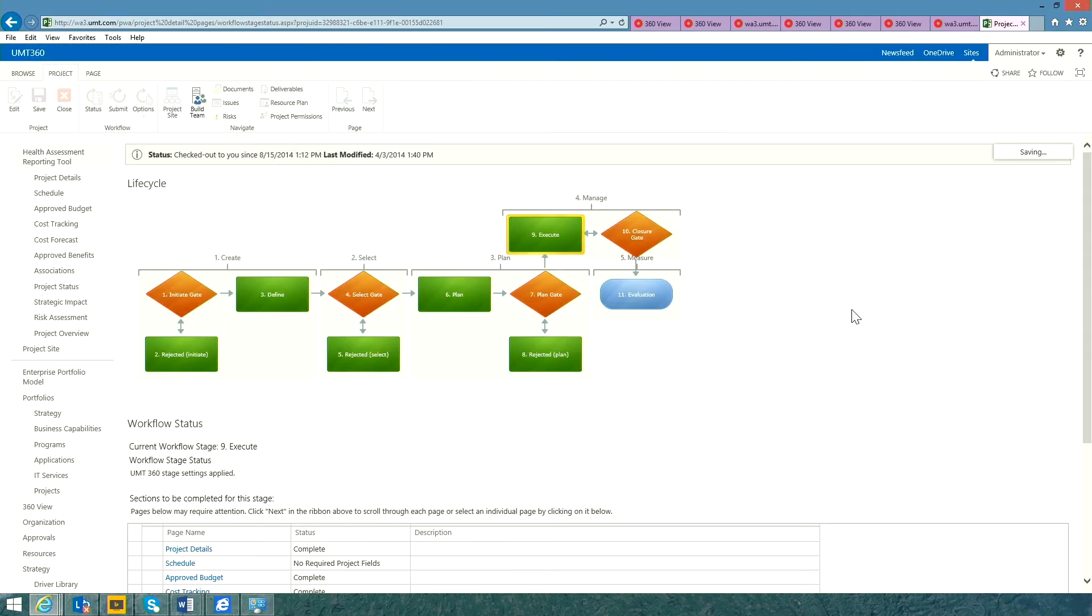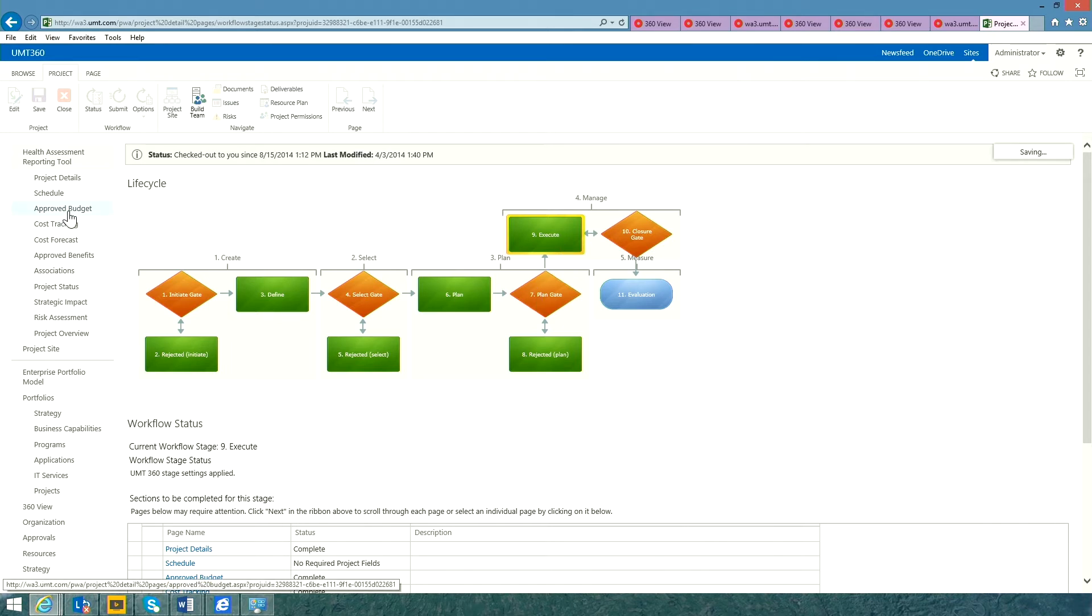As we can see from the UMT360 workflow visualization, we're currently in the execute stage for this project. When this project was approved, we automatically locked both the cost and the benefit estimates, and now we're ready to track the financial performance of the project.